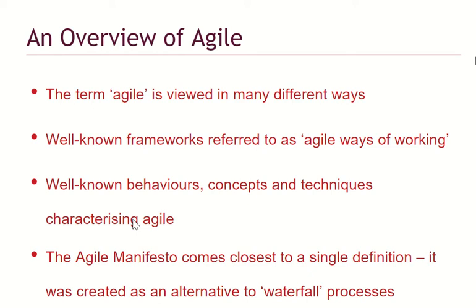But in Agile, if you do a building construction, you break the building project down into different milestones or what you call iterations. For example, you can start with the carcass. What is the carcass? Laying of blocks. After the blocks are laid, you come and agree again: what do we need to do? Now the blocks have been laid, there is no roof yet, then you agree on the roof. After the roofing is done, you can take roofing as another iteration.